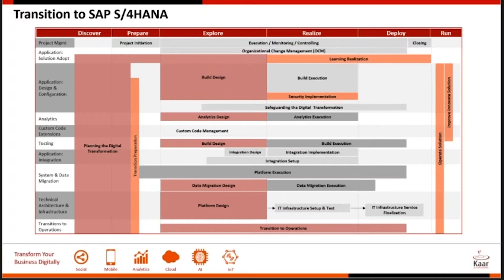Under design and configuration, typical activities include identification and design of functional changes based on fit-gap workshops run with IT and the business. This becomes critical because solution adoption depends on it. For analytics, any customer currently reporting data from ECC and possibly other systems should relook all reporting methodologies with S/4, since it has embedded analytics features that may allow those reports to be done directly from S/4.